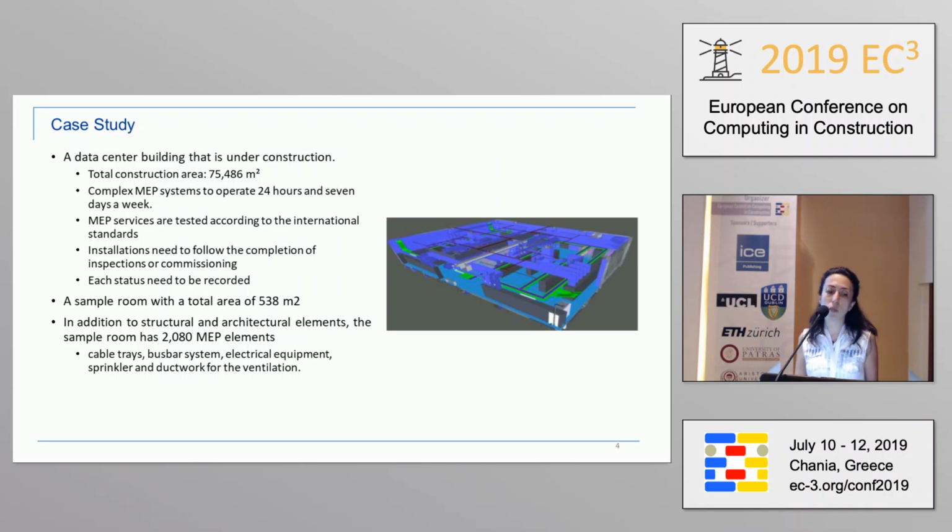The MEP services are tested according to the international standards, and in order to install some components, you need to make sure that some other components are tested or commissioned, so that you can start the other ones.